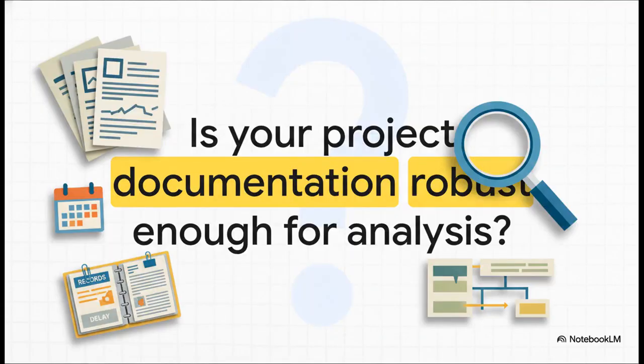And that leads us to the final and maybe most critical thought. Knowing this method is absolutely half the battle. But an analysis is only as good as the data you feed it. So the real question you have to ask yourself is this. Is my project documentation, my schedule updates, my daily reports, my records of what actually happened, is it all robust and timely enough to support a claim that's truly accurate and defensible? That's the question every project team needs to answer.